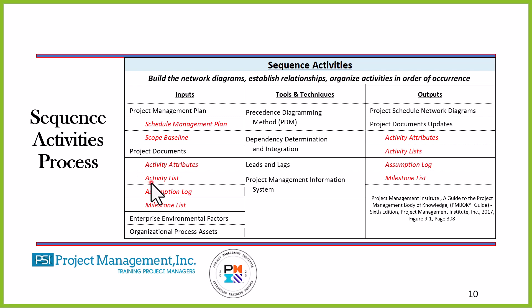The activity list will be what I use to sequence the activities in the project network diagram. The activity attributes is a companion document to the activity list. The activity list just has the list — not sequenced, in random order, without a lot of information. The activity attributes will have the details for each activity: sequence, details of what you're going to do to execute it, and the resources needed — both physical and human resources.